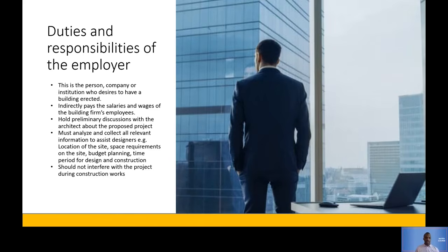And then the next thing is telling about the space requirements, that in Pretoria, this is the amount of hectares I have to build the mall. Then the budget that I'm willing to pay, so many millions for this building, and the time period for the design. Now they can negotiate and say, I'm giving you 6 months to design the mall, or I'm giving you a year to design the mall, and everything included in it.